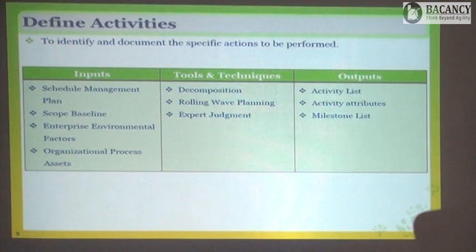Okay. You will identify what dependency these activities have. So we know that these activities need to be run in parallel. Next activity, boil tomatoes. Can I boil my tomatoes without or before I complete my buying? No. It has a dependency. Buy tomato is a predecessor for this activity, which is now a successor. So it is important that I first finish my buying process and then only I can boil them. Prepare spices, again, first I need to buy spices, then only I am going to prepare that.